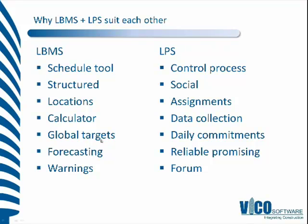So we've got the global side from the location-based management system going right down to very granular daily commitments at assignment level. From the location-based management system, we have a system that collects and analyzes actual production data with a forecasting mechanism, and these forecasts allow us to have a more reliable promising process — learning from past performance and making more reliable commitments.